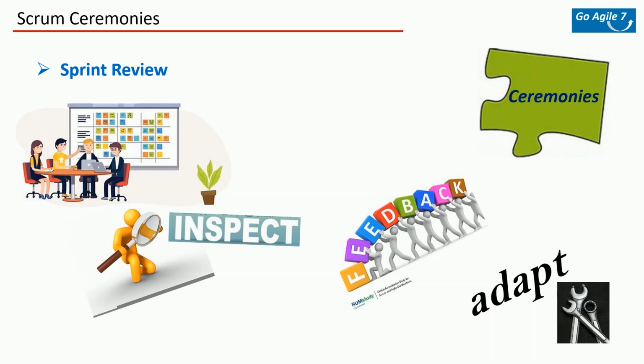So during the sprint review, if any new changes are suggested or if any were suggested to be dropped, then the product owner will note them down and accordingly adjust the product backlog. So in the next sprint, when you go for sprint planning, you have the right stories to proceed further. And here we are not reviewing some documentation in the sprint review, but it's more of demonstrating the actual tangible product that's been developed so far.